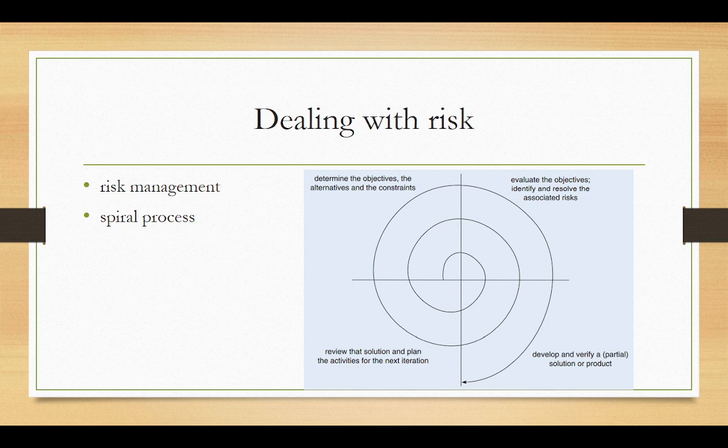A software solution to a problem needs to be considered in the broad context of the domain to allow you to manage the risks associated with a development project. So how to deal with risk? For example, if delays cause the team to miss the market window, it does not matter how much software has been developed, because it is no longer of benefit to the customer and users. So assessment of the risks and taking steps to reduce them are important activities in software development. This is known as risk management.